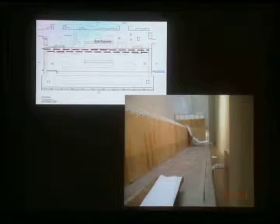Should dust settle everywhere, it would be too time-consuming to attempt a vacuum cleanup of all these surfaces. So if an accident happens, we carefully gather up the outer layer of plastic, and should some dust escape, it settles on the second layer instead of on the art.